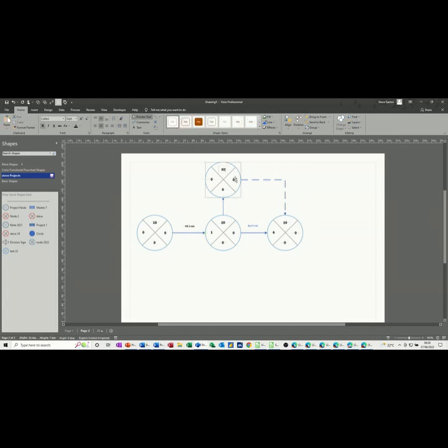So the task or the activity for this one is going to be prep cups. So I'll just put a text box there, and it's going to take 1 minute. Prep cups 1 min. So that can happen at any time. So it's just going to be 1 minute. So this is going to be a 2. I need to take that off. This is going to be a 2. 1 there, look. 2. And we'll fill this other segment in when we're coming back down to find the latest event time. So far so good.